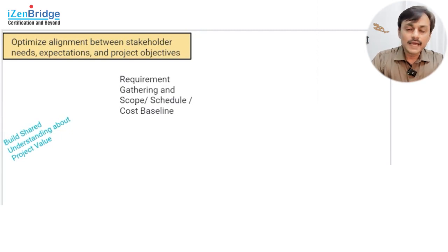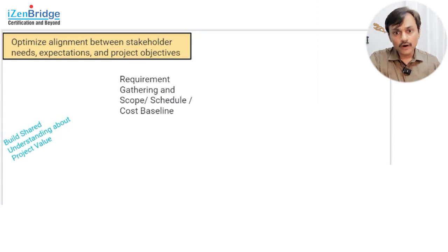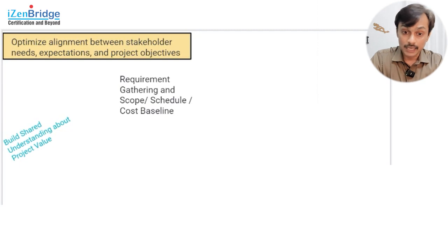So as a predictive lifecycle process, I will do engaged requirement work and I will reach the baseline, and I will involve all the powerful and relevant stakeholders for the baseline. Going forward, we can keep referring to the baseline. So I start with a shared understanding at a value level, and then I need to convert that into my project management plan, which ensures complete alignment.